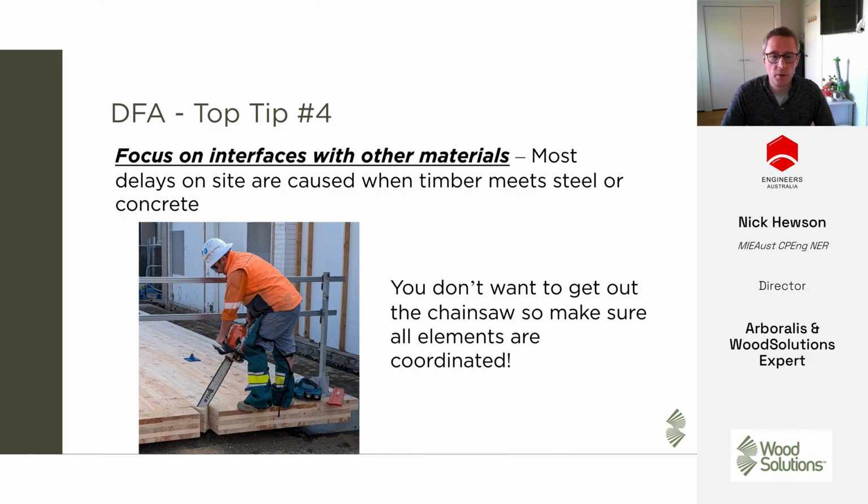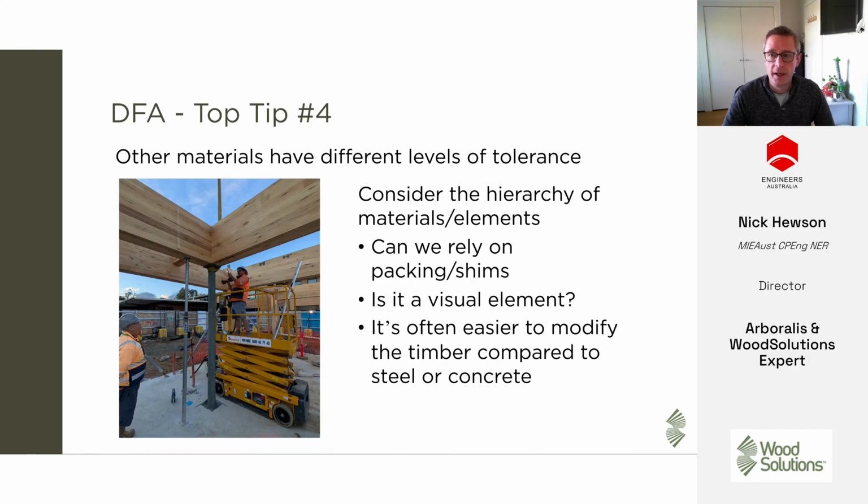Interfaces with other materials are always where things are delayed. I was lucky enough to spend a day on site with an installer that I've been working with over a number of years. Pulled the hard hat and the high vis on and went to be a labourer for a day with them. And it's amazing how fast they can install things when it's timber elements. The second it all kind of meets a concrete element or a steel element, that's where it all seems to go wrong. Making sure that models are fully coordinated, shop drawings are fully reviewed,